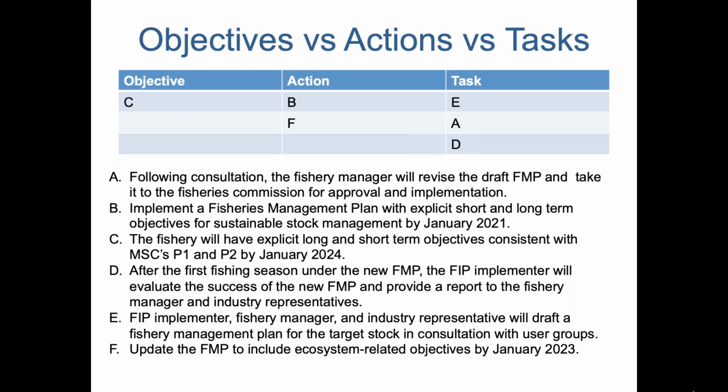But the way that I think about it anyway, is that it's best to write the objectives in a way that pins them to an MSC performance indicator, the language within a performance indicator. And those of you who also work on full assessments will understand this also to be kind of the requirements for writing a condition in a full assessment. In terms of the level at which you determine what is what, because actions are also kind of objectives, I would say that you shouldn't write an objective that's any more granular than a single performance indicator level.